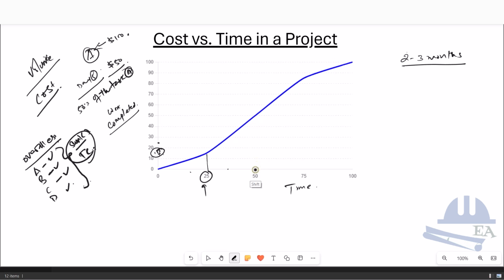So if you see over here, then you will see that at the 6 months time period, normally it's 40 to 50% of the work is done. So over here, I'll take the average, that is 45% of the work. Okay. And if you take a larger window, at least you have to achieve 40%, and the best you can do is 60% of the work. So it's normally a 40 to 60% window. So I have taken the lower side, the safer side.